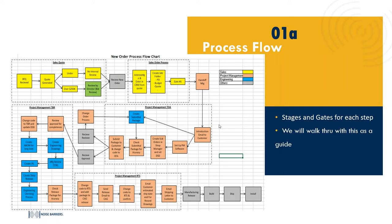The order then goes through Gate 1, which is a handoff to management — sales meets with a project manager to review the scope of work. An introduction email is sent to the customer stating who your PM will be. The PM will reach out to gather any additional information required, and will also work with you on any change in scope or order size, coordinating a change order with the salesman to get a revised price.